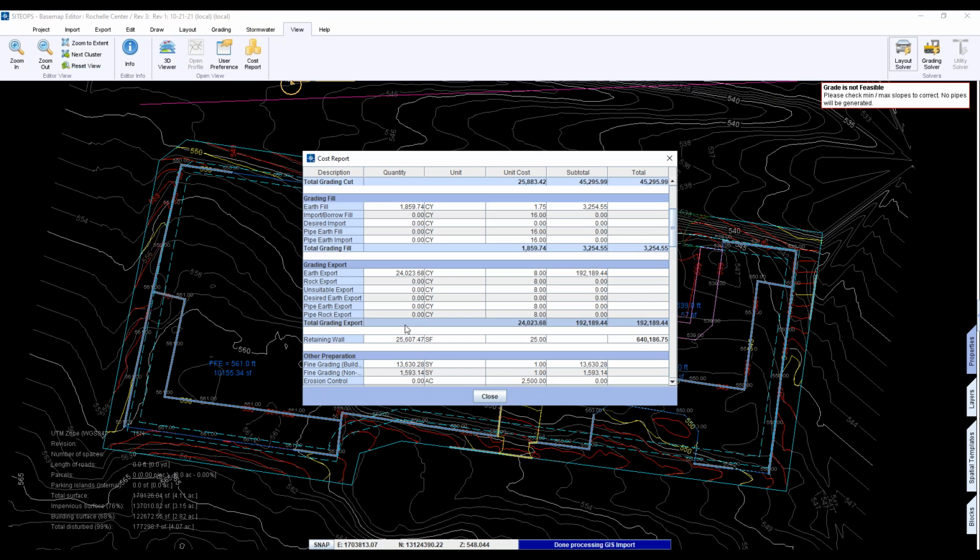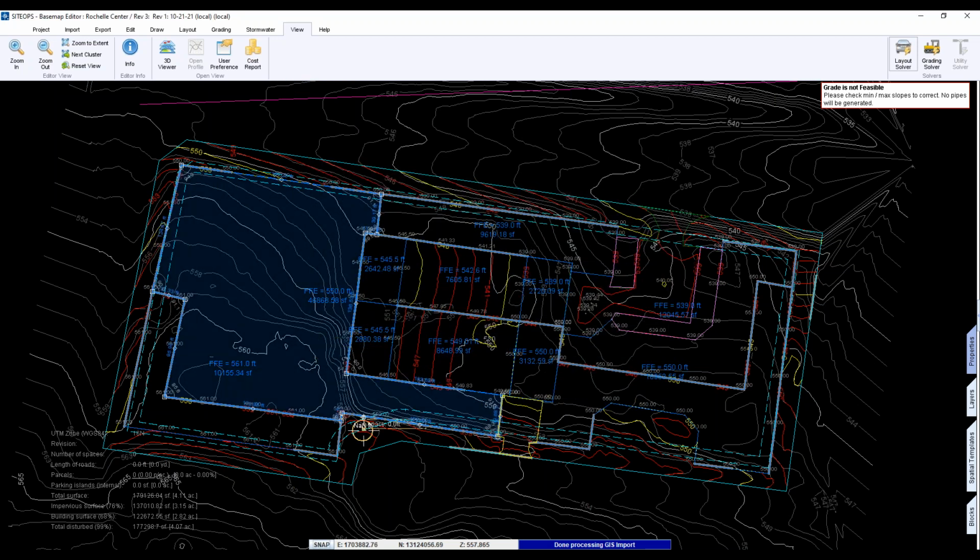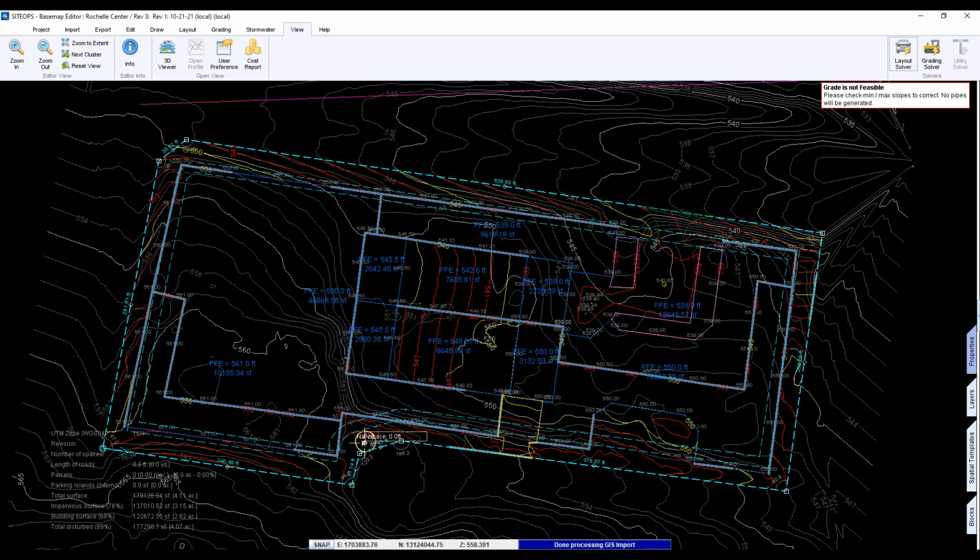Now, if it's a different one, and this just happens to be one where we're restricted for certain elevations, so we can't let it float the slab to where it wants to go. In other ones that it would play out, and in that case, it probably would make sense that, okay, if I'm doing concrete walls, I need to be somewhere around 70 a square foot all in rather than 25 because these are concrete.